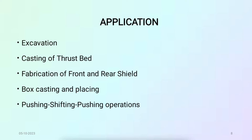Now we have its application. Excavation is carried out at the entrance and exit. After that, casting of thrust bed for guidance of the box takes place, followed by fabrication of the front and rear shield, box casting and placing, and then the pushing or shifting pushing operation.